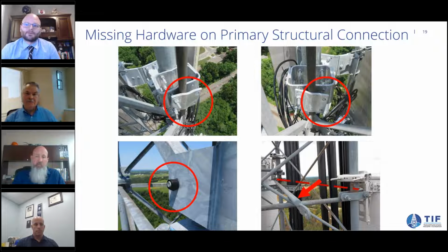So if you think about that, those go on different cycles that meet each program's needs. But this could be years before it's caught in that maintenance and condition assessment. If a properly done post-modification inspection or post-installation inspection had been completed, these issues would have been fixed in a much more timely resolution. Take you to that top left picture there.